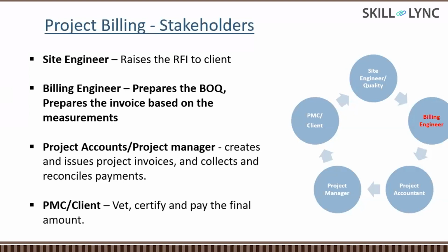Once the client is satisfied, he will be certifying the bill, giving a copy to the contractor, and paying the amount. Generally, what happens is a lot of projects are not completed within the time, because it takes a lot of time for a contractor company to raise a bill to the client. And then again, it takes a lot of time for a client to go through these entire documents. If the billing documents are not adequate, then the payment will be delayed.